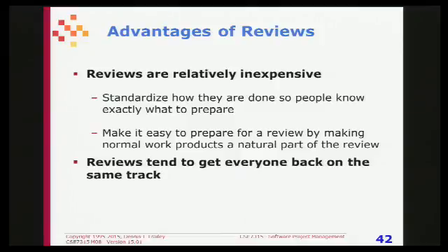A big advantage of reviews is that they're relatively inexpensive. And one of the things you can do with reviews is to standardize them. We always show the same 10 slides or something like that. That way it's easy to prepare, and it's easy for people to understand what you're telling them because there's a standard way of communicating. Reviews tend to get everybody back on track.